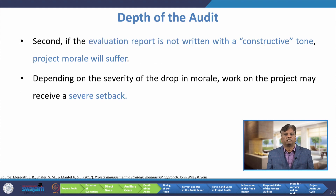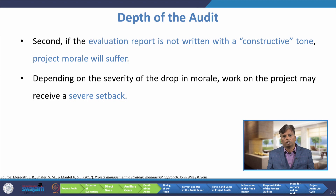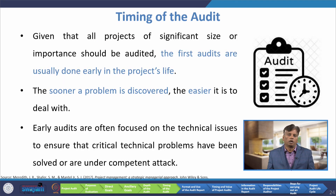Second, if the evaluation report is not written with a constructive tone, project morale will suffer. Depending on the severity of the drop in morale, work on the project may receive a severe setback.